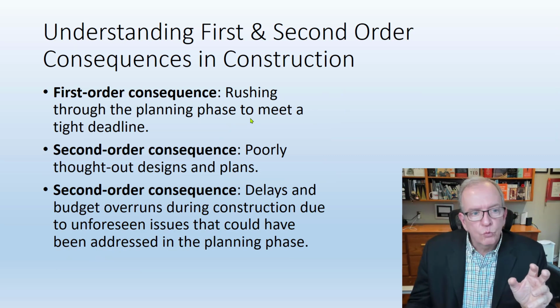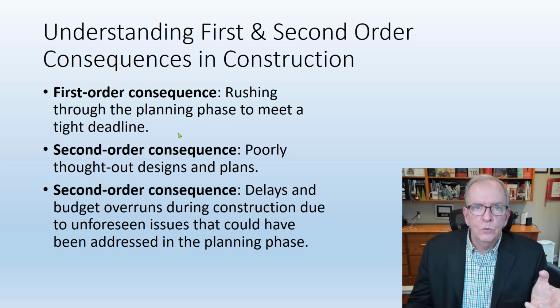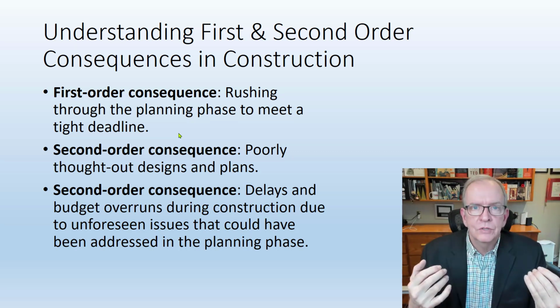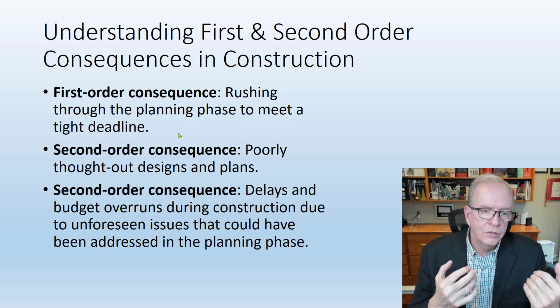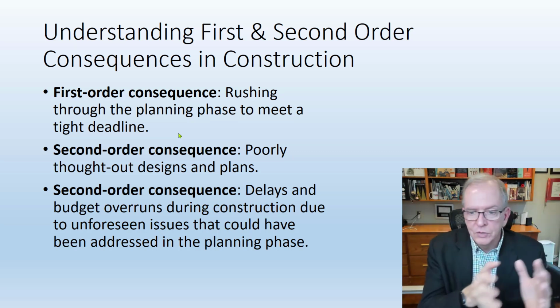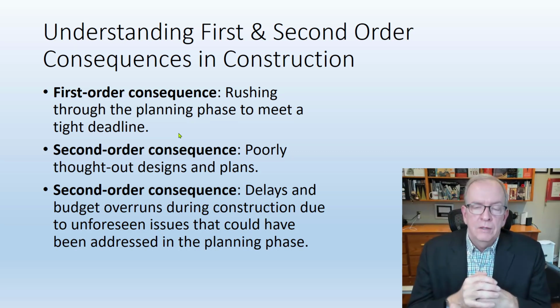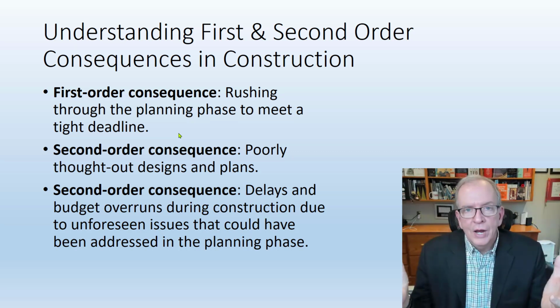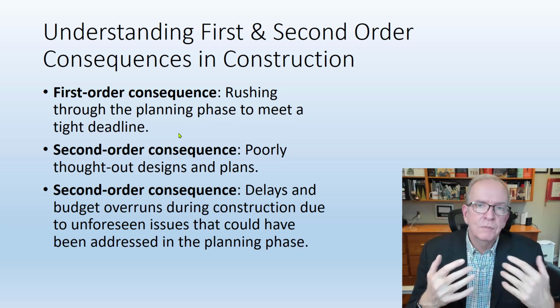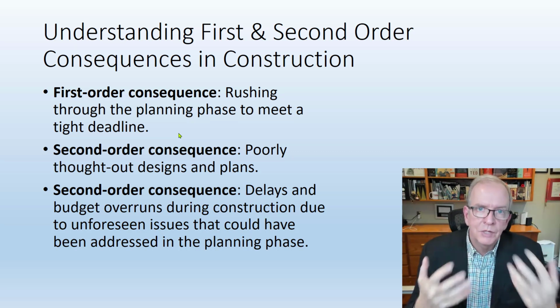First order, second order: rushing through the planning phase to meet a tight deadline. This is something we do all too often in construction. We have these design-bid-build competitions, right? You get awarded the contract, and in your original schedule you say you're going to get the letter of intent and start doing all this stuff right away because that helps you secure the contract. But the reality is, if you're rushing that fast on the planning phase, then you're going to be more in reactive mode during the execution phase.